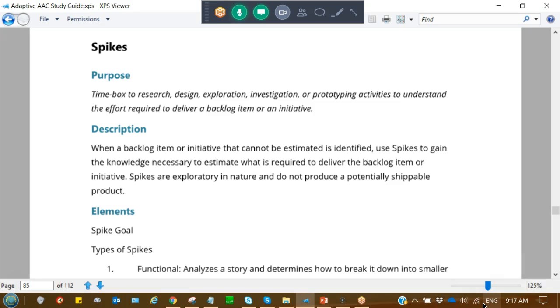And so there is this technique called spikes, where you're allowed and encouraged to take time to say, okay, here we need to do some research work, we need to do some investigation on something that we'll implement downstream, we'll do later, but right now we're going to take a chunk of time to do this, and not say, well, our delivery team always has to be writing code.